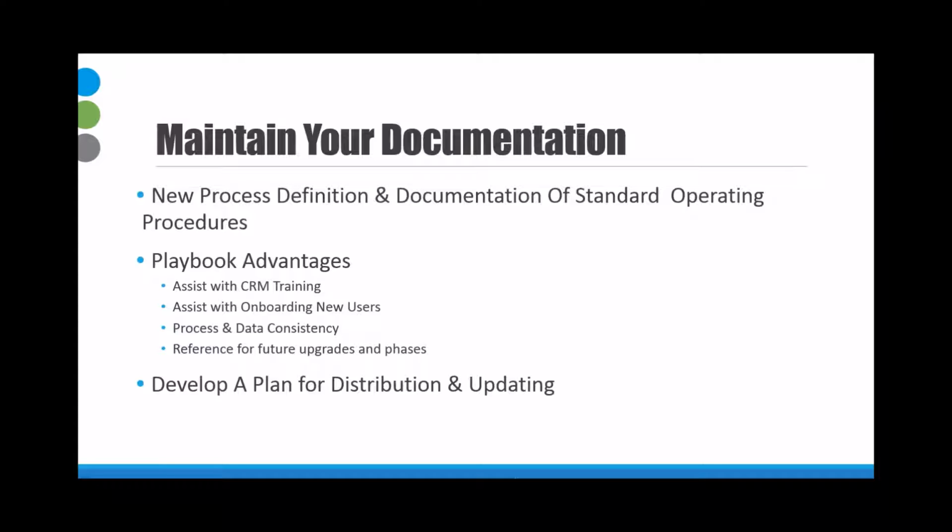For example, on the project I worked on, we redefined the logging of a sales call process. The calls that were to be logged were supposed to be for current accounts or distributor prospects. However, after the system was launched for some time, members started using these sales call reports to write up notes about potential leads or trade shows. Really, the scope and purpose of that sales call report was being deviated from. Leads are supposed to be logged in the leads entity and trade shows in different areas. If I had a documented process sheet that clearly defined how sales call reports were supposed to be used, that would have been helpful in keeping the system clean.